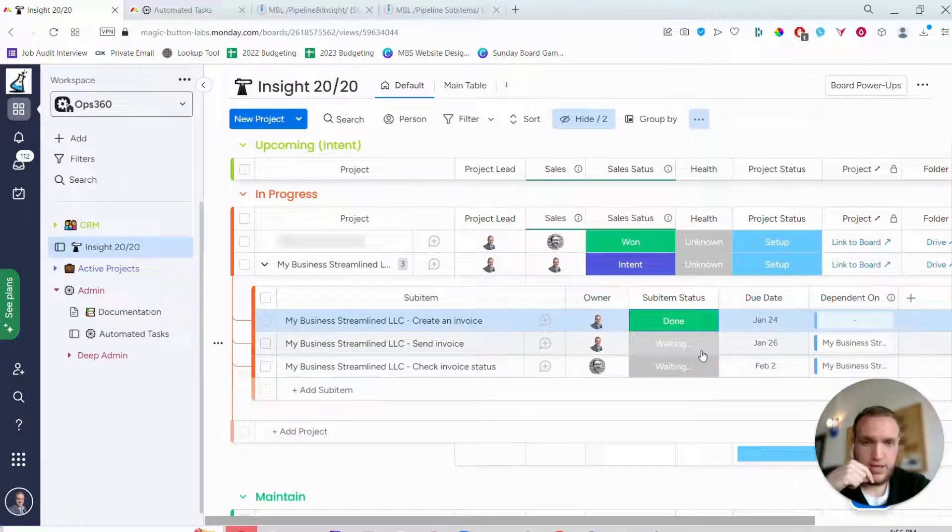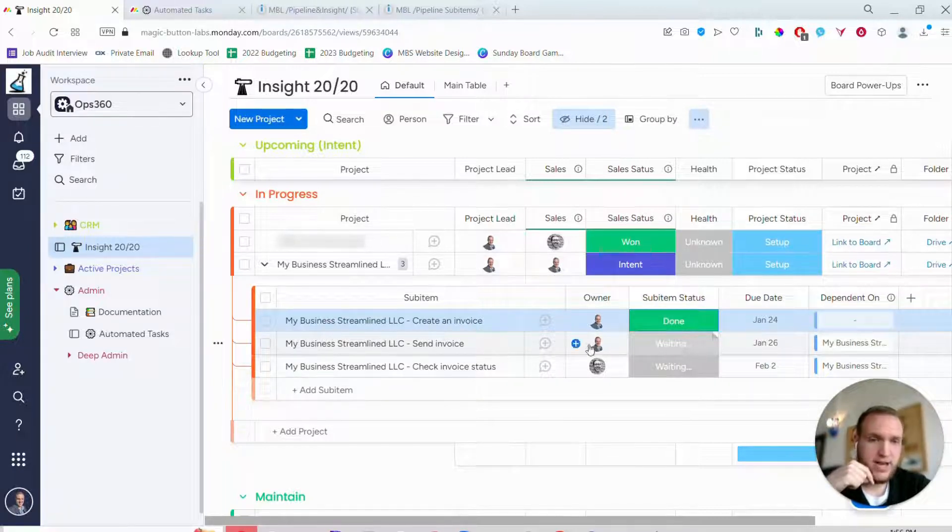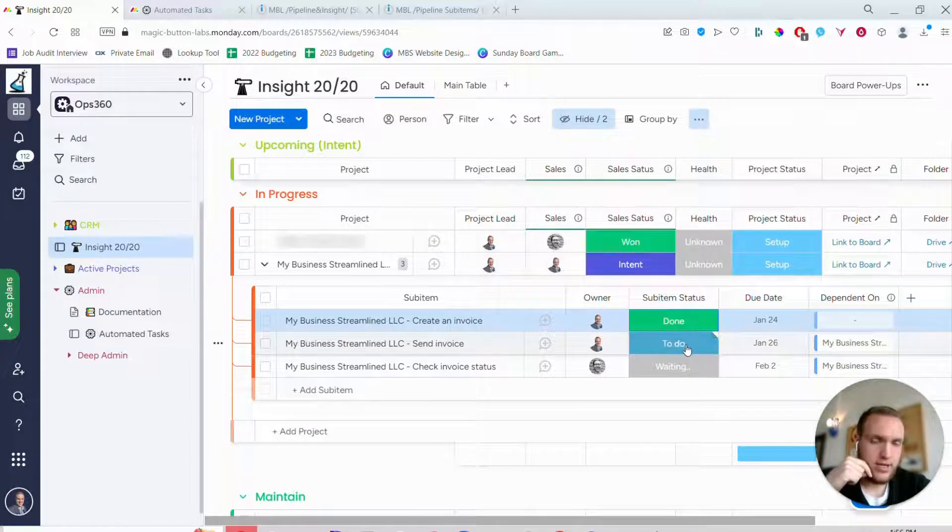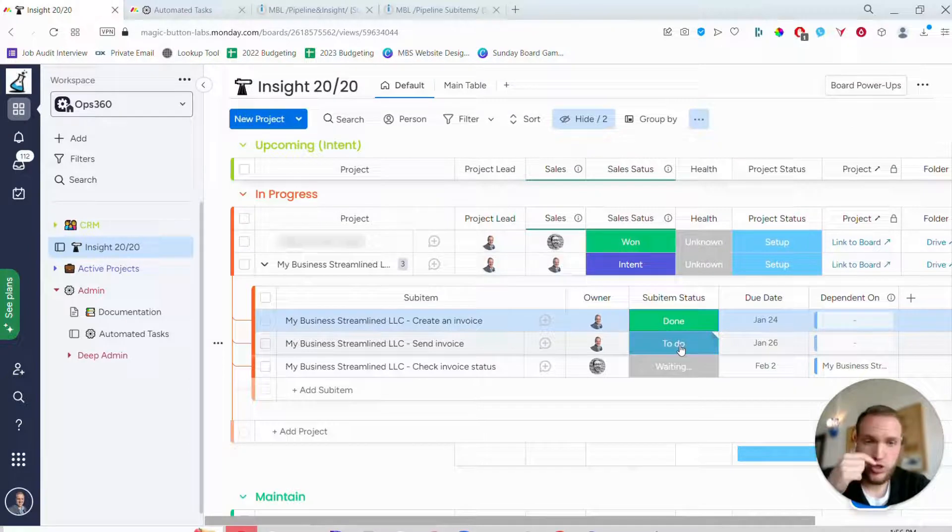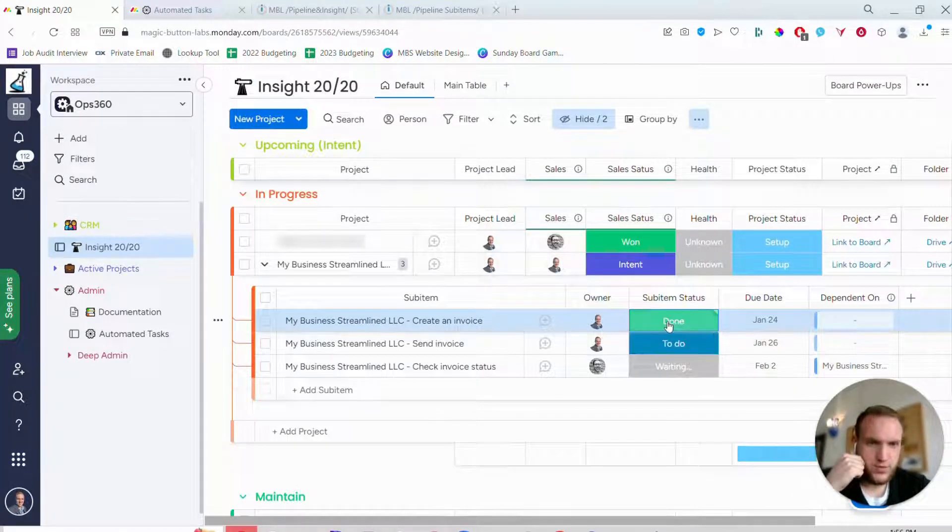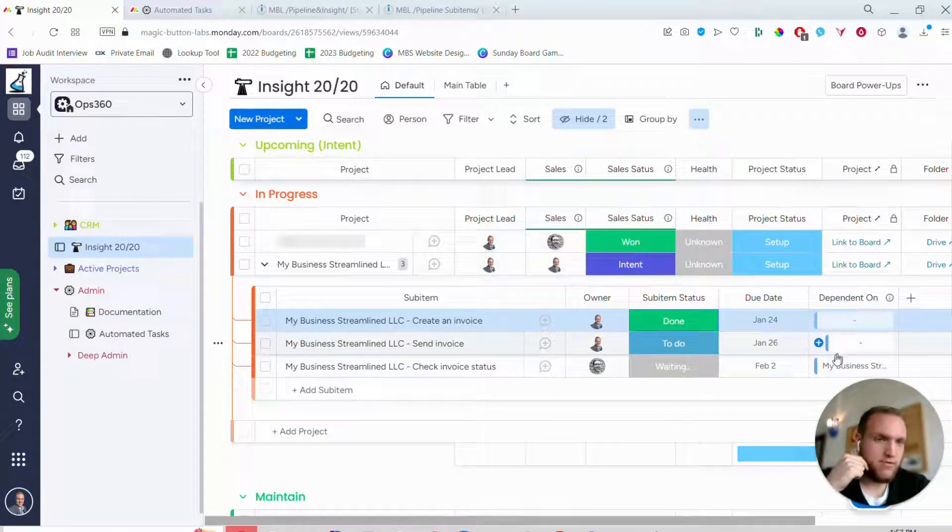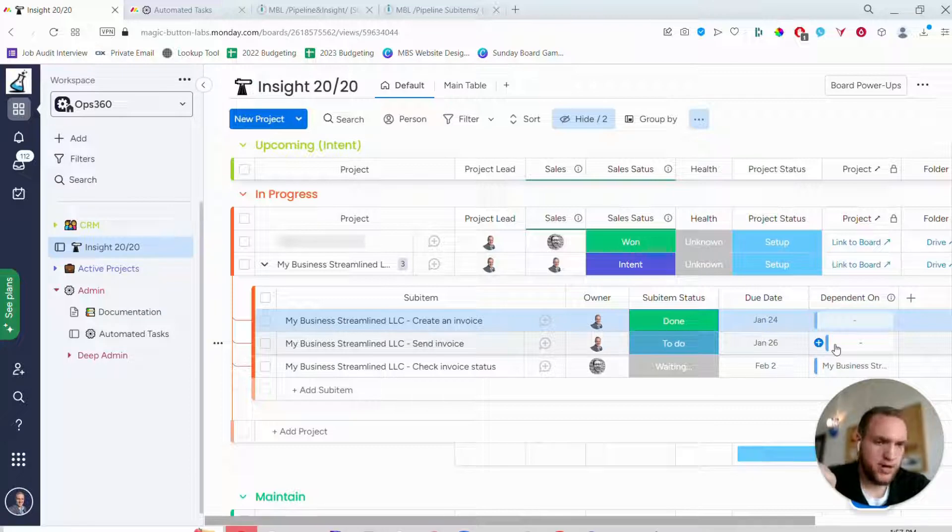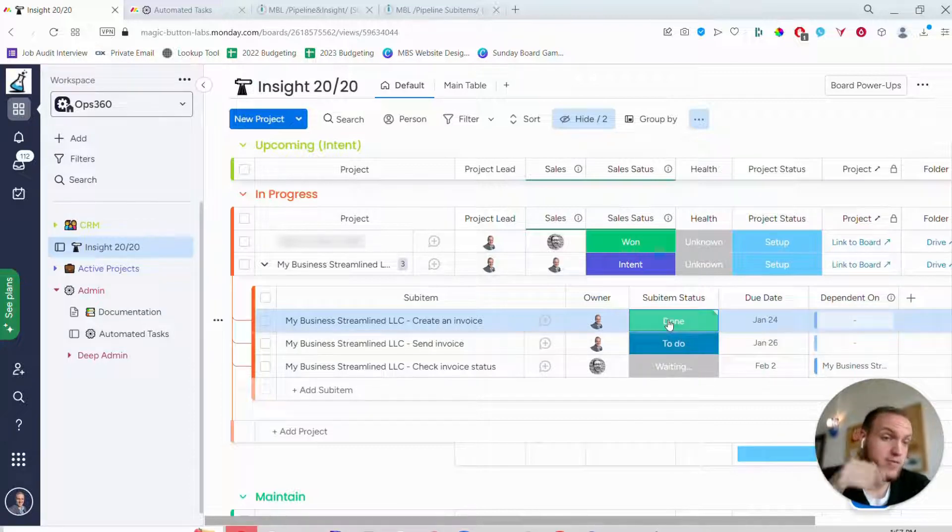So like if I move this to done, it will actually kick off the next task and change this to to do. So now you'll see that this one is to do, this one's finished, and it will remove the dependency because it no longer depends on anything because the previous one is finished.